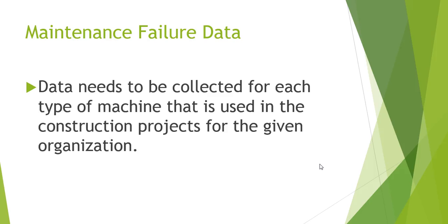profit on a project, or result in a penalty because you have to pay liquidated damages when you can't meet schedule, a mile point, or an end date. So a machine going bad can be an expensive proposition. So you want to collect data on how well it's maintained so that you can calculate how available a piece of equipment is.